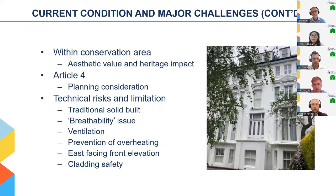But there are some greater technical risks for retrofitting. This revolves around how the building might act with the upgrades to the envelope, so our ventilation and heating strategy needed to fully consider this. We are set to collaborate on some breathable solutions regarding the fabric treatments. Despite the building not being high-rise, it is densely populated, so facade treatment comes with the inevitable concern over fire safety.